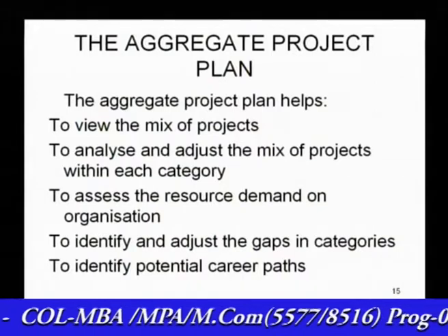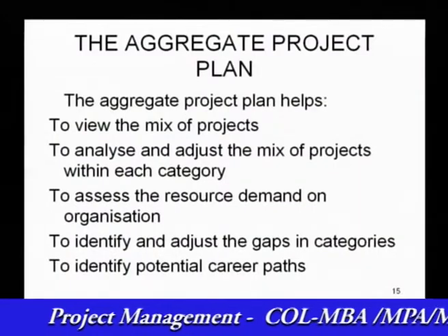So in view of the mix of the projects, we have to make a plan, because the projects may be from all categories. Within each category, one would want to adjust and analyze with reference to various management aspects. Most important is assessment of resource demand of the organization, indicated by the size, timing, and number of projects. Further, a project manager will have to adjust gaps in categories, aspects, sizes of projects, and timing of the projects, which also means that sometimes the projects enter into different phases at different times.